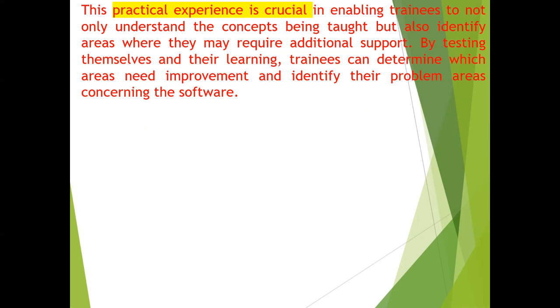Also, maybe you create a program and then look at the resource histogram. You can view the resource histogram the way you want: day base, weekly base, monthly base, or every 2 weeks. Normally, we do a monthly base and a weekly base. Day base, we don't do normally. I'm talking from my practical point of view. We do weekly, and from the weekly we can generate the monthly. Then let's say you find that some resources are over-allocated.